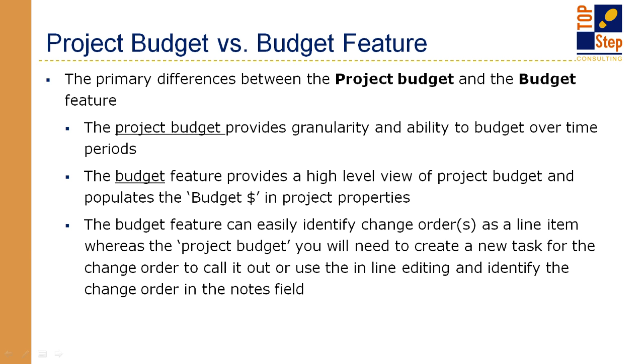And then the task will be named change order, or whatever your naming convention may be, but that's an easy way to call it out. The other thing is, if you don't do that and you want to add the additional fees, it's not a discrete activity, so you don't want to create a new task. It's more money for content development because you didn't get it finished, or they added scope or something of that nature. Usually it's an add scope. It typically gives more money because we had a bad estimate. But regardless,